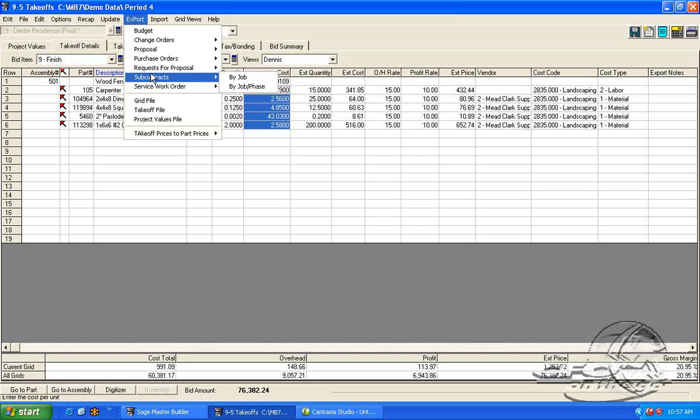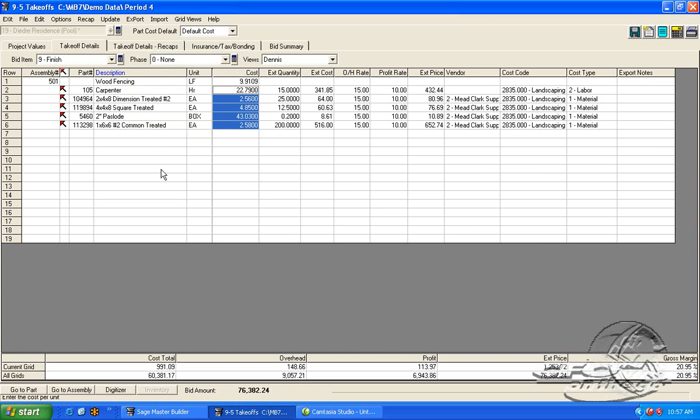And we can also give a list of all of the parts that we have listed in this estimate to our foreman or superintendent, so he or she knows what needs to be taken out to the job to complete this job, so that they're not running around looking for individual items when they get out there. They'll have a list of everything that's required to build this job. And again, this is more of a subcontractor type of estimate, but it works similar to the one that we did for the general contractor. Again, you probably don't build swimming pools.